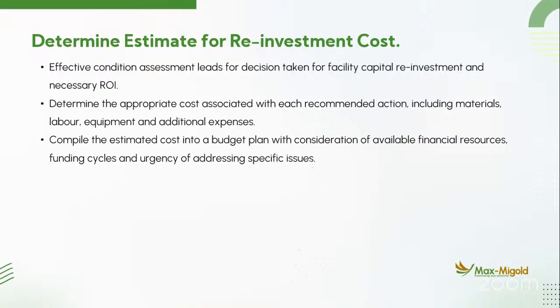These are costs. Compile the estimated cost into a budget plan with consideration of available financial resources, funding cycle, and urgency of addressing specific issues. So with your condition assessment, you know these are the list of the problems you have. I can easily attend to this because I have the financial capacity to do that. This one, I don't have the financial capacity. I can defer it till maybe next year, or maybe to next month, or to next quarter, or the last quarter of the year.